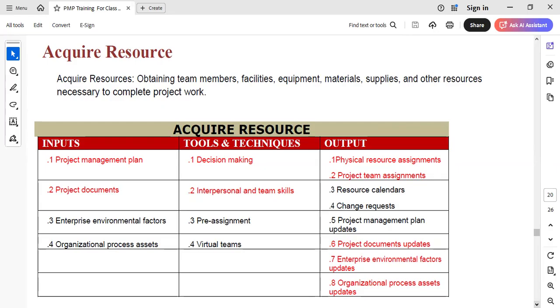When you look at the resource calendar, you should know when you are on duty. You should know when the excavator will be used. You should know when the bulldozers, the earth movers would be used. You should know when the crane would be in operation. That is what the resource calendar would specify. When am I coming to work and how long would I be there? The resource calendar would depict it and clearly you will see it. So now with this explanation, you now know what the resource calendar can do for you.